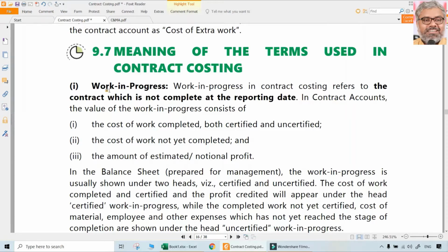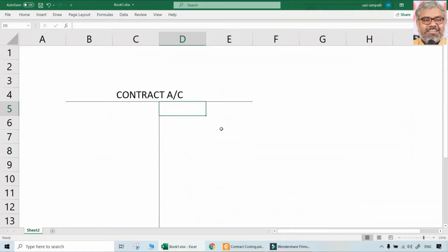So here, on the credit side, what will be there? Okay, debit side, all the costs related to the contract are there. On the credit side, what will be there? Can we credit the contract price? No, we cannot. Why? Because normally the contracts are carried on over a period of time, not just completed within 1 year also a lot of times. So the costs that you are all debiting are factual things. The credit, if you give to the contract price, that is wrong. There is no matching principle there if we do that.